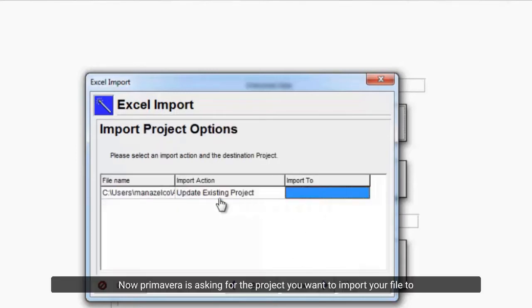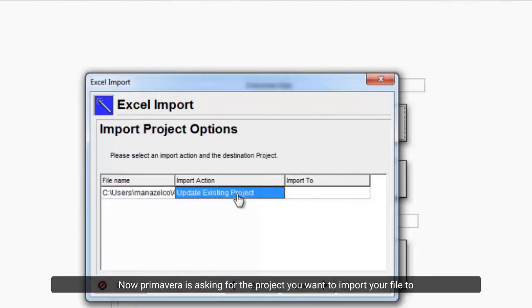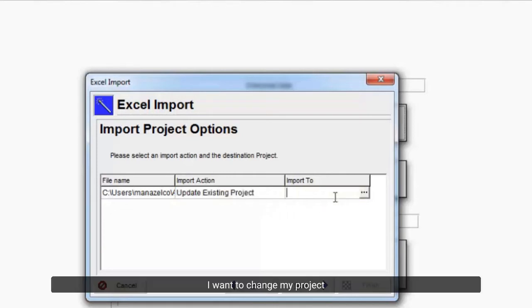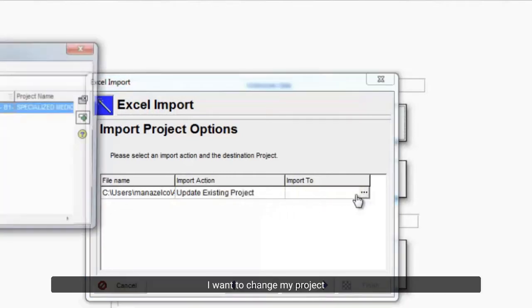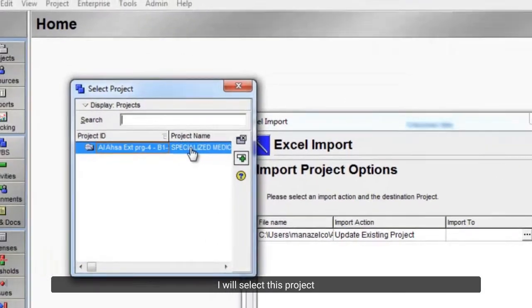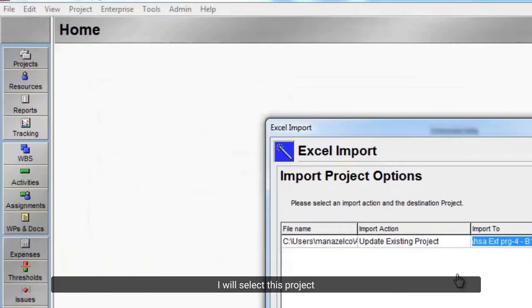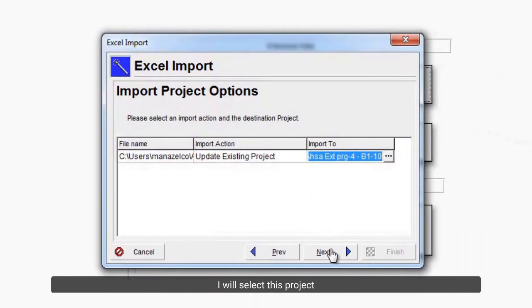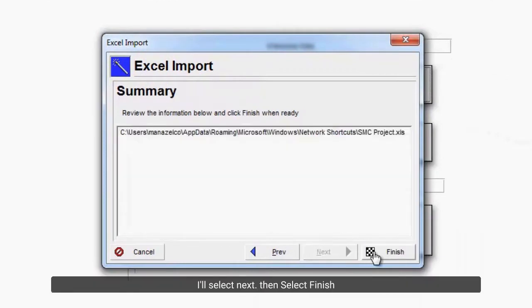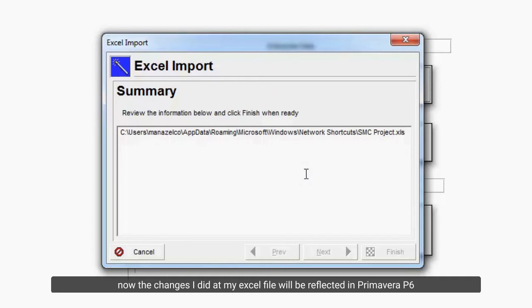Now Primavera is asking for the project you want to import your file to. I want to change my project. I will select this project. I'll select next. Then select finish. Now the changes I did at my Excel file will be reflected in Primavera P6.